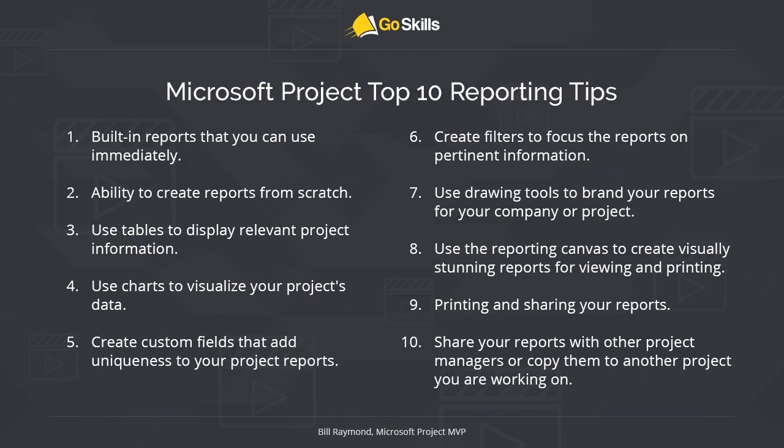And we did that by also going to the print preview section and making sure not only does it look good on my screen if I'm going to project it, but it also looks good if I'm going to print it. And remember, with Microsoft Project or all of Microsoft Office, most people nowadays have a PDF driver on their computer, so when they go File, Print, they can also print to a PDF file. Most people have the ability to do that nowadays. And then finally, I also shared with you how to use the Organizer so that you can copy your reports from one project to another.